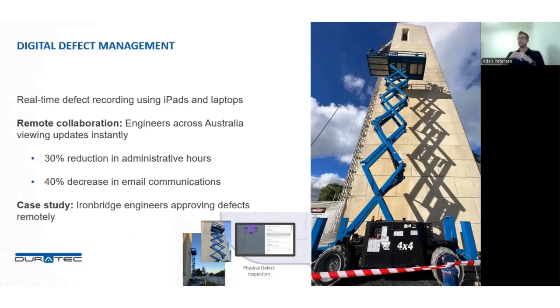Once that information was in the 3D model, engineers in Sydney could then instantly see updates from the site in Canberra, or across Australia for that matter. And then our consulting engineers could preview, and sometimes approve, defect repairs without having to actually come to Canberra. That's a huge administrative burden which has been lifted, and a lot of savings in time and, in the end, dollars.